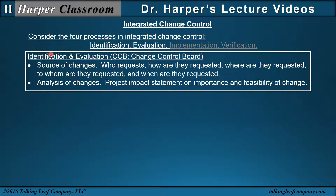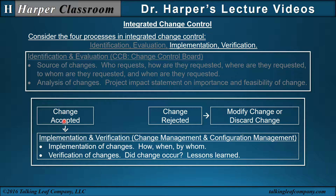Starting with identification and evaluation, the change control board decides the source of changes: who requests the change, how, where, to whom, and when they are requested. An analysis of changes focuses on the project impact statement — the importance and feasibility of change. If a change is accepted, then implementation and verification follow, which includes change management and configuration management. This covers how changes are implemented, when and by whom, and — most importantly — verification: did the change actually occur, what are the lessons learned, and how effective was it?